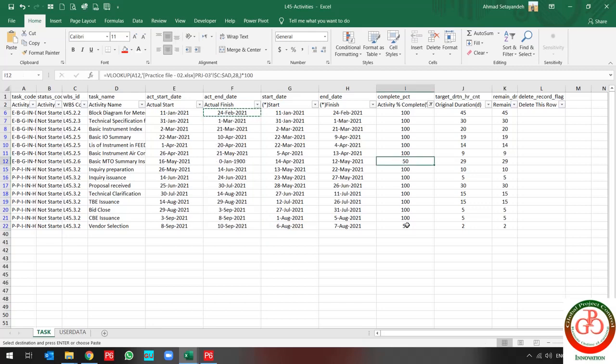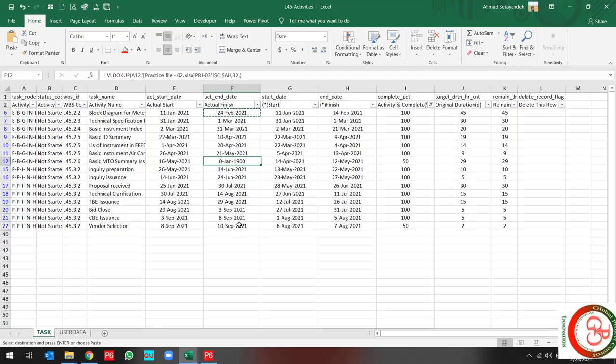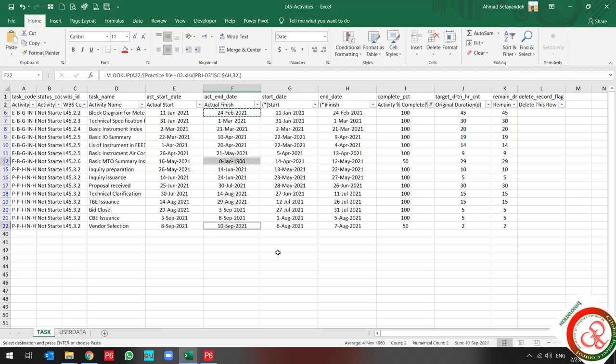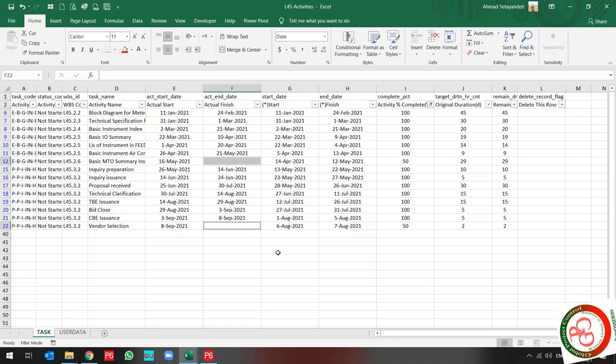For these two values, because my task is not completed, I should remove the actual finish date.